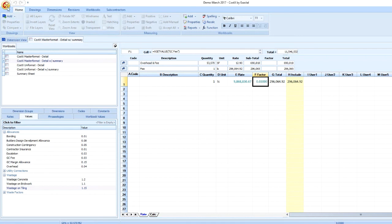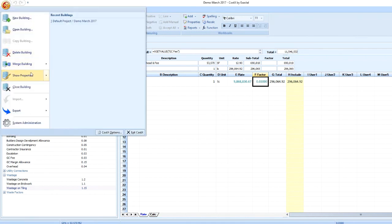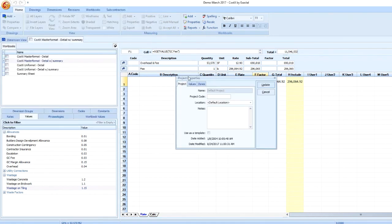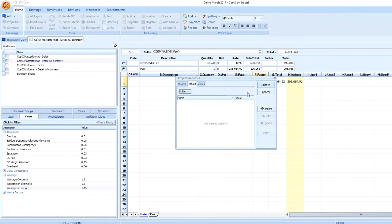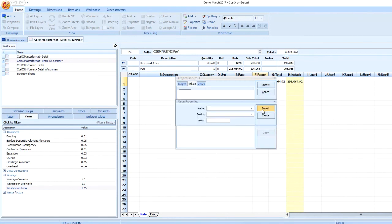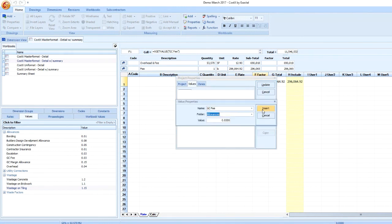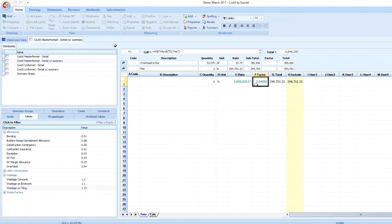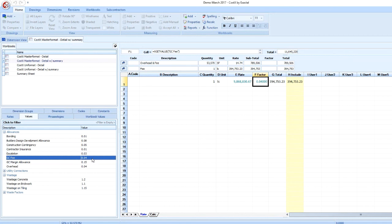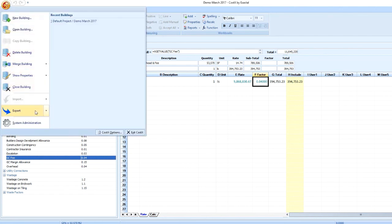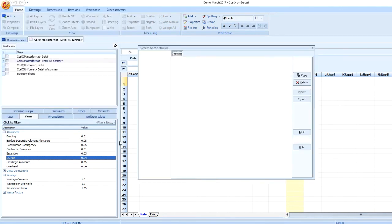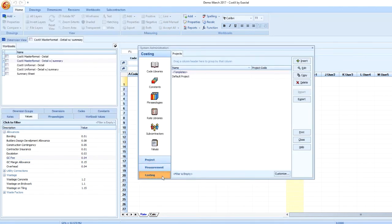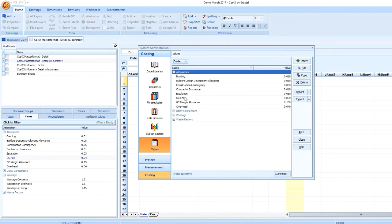I can do so by going into Project Properties and clicking into the Values tab. From here I can insert a GC fee that will be specific to this project and override any previously linked standard value of the same name. I'll set this fee to 4% and update. The fee for my project has been updated and the Values tab now is showing the superseding 4% GC fee. This fee is unique to this project and has not changed my list of global standard values. I can review my standard values and confirm that the global standard value for GC fee remains at 3% for future projects.